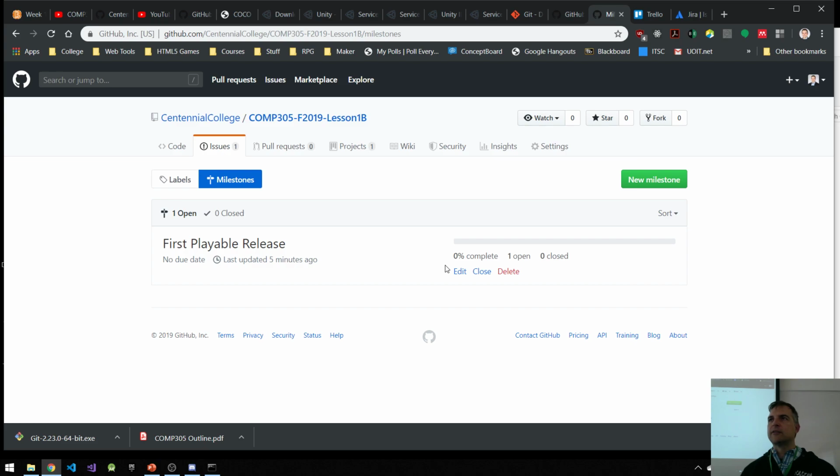If I had 10 issues and I completed 3 of them, it would be 30% complete, right? And that actually shows you how complete the first playable is. So it gives you an instant look, a dashboard of how your first playable is going. At the same time, you can have multiple milestones that you're working on at the same time, right? Something else that you're working on, maybe a bug fix milestone. Not really a release, but some kind of bug fix because you have some bugs that you've got to remove from your code. Okay, and that is really project management in a nutshell.